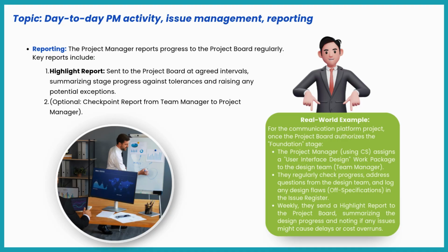Example: in the Communication Platform project, the PM assigns a user interface design work package to the design team. They monitor progress, address design flaws, off specifications in the issue register. Every week, the PM sends a highlight report to the project board, noting progress and any risks of delay or cost overruns.